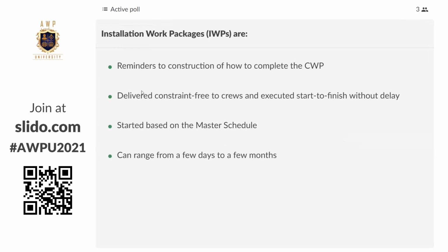Possibly. They're delivered constraint-free to crews and execute start to finish without delay. That's a definite. So we don't send them to the field unless they're constraint-free. They're executed start to finish. Remember the definition of an IWP. The definition of an IWP is, quite frankly, a scope of work for a single crew that can be completed from start to finish without stop or delay. So that definitely fits.